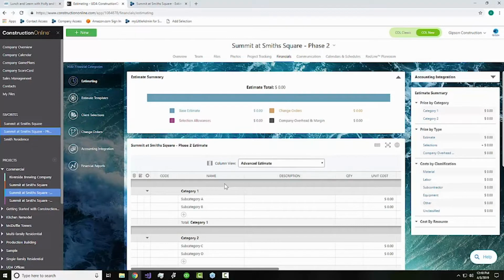And so what Jordan means here is that in the standard estimate layout, each of these lines is going to be assigned a unique classification. In a 5-column estimate, we would see these classes as column headings moving along. So when we start to put together and structure our estimate, if we're doing this as a blank estimate, there are a few things I want to bring to your attention before we start filling this out. The first one is that you've got some options here that you'll notice on the top and right hand side of our screen, above and to the right of the estimate.